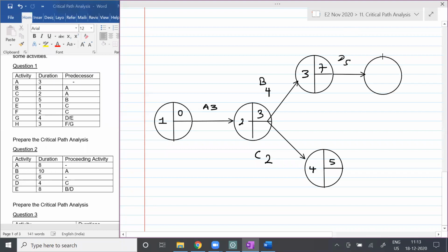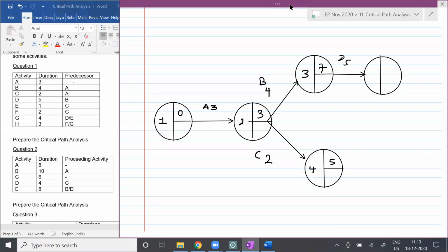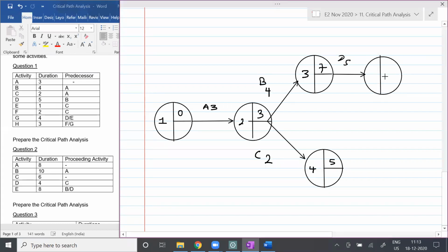Now students, I'll just do the punctuation here. So ready now? We can work with that. Node is mentioned. So if D wants to complete in the earliest possible time, how many days will it take to complete D? 7 plus 5, which is 12. Is that fine, students?